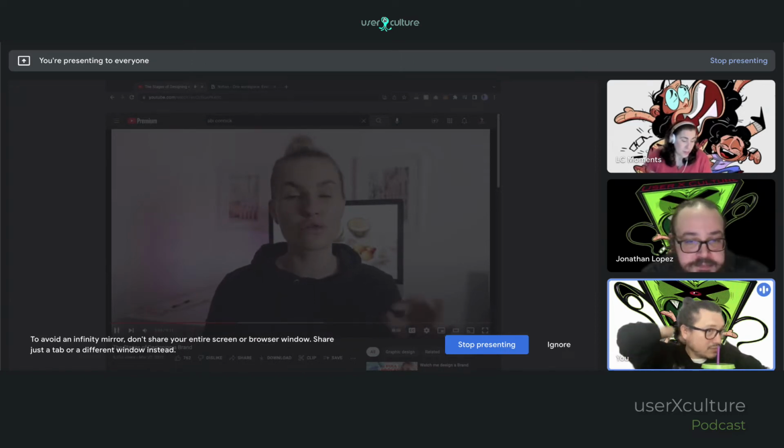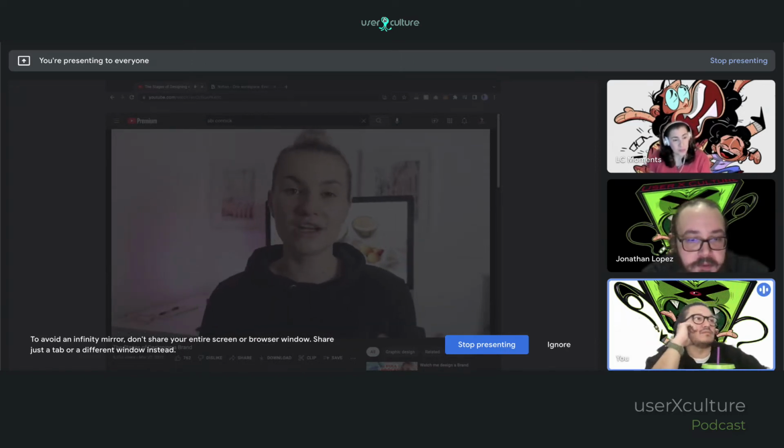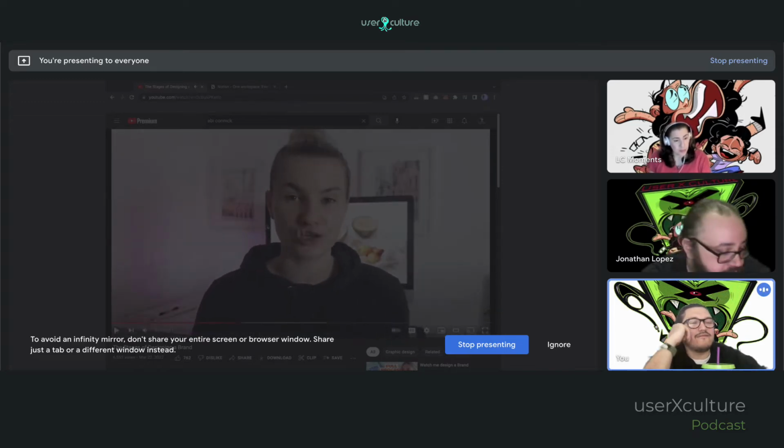will be uploaded for receiving feedback. At this stage, I also take an upfront payment of 50% of the project cost, which secures the client's place.